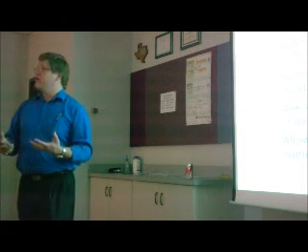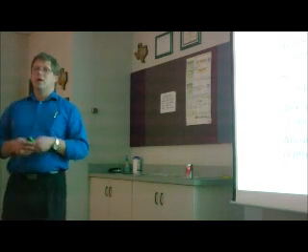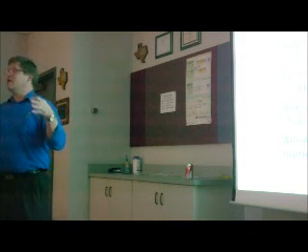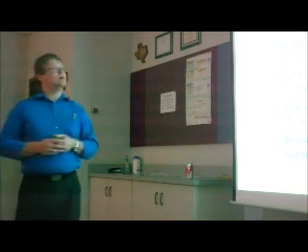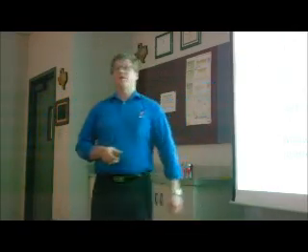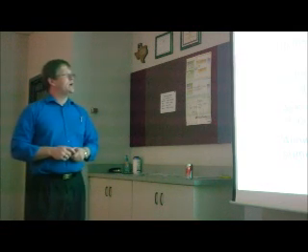Why? The more information you give them, the more accurate their quote is going to be, the more specific it's going to be. If you give them just vague specifications, they're probably going to give you a pretty broad range as far as the cost because they're not going to know for sure. So you want to give them a list of your mandatory versus desirable or important items.